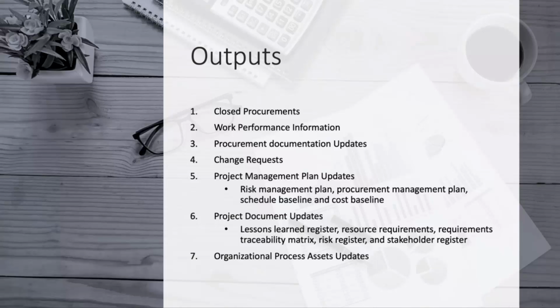Number 5, project management plan updates. Any changes to the project management plan go through the organization's change control process through a change request. Components that may require a change request for the project management plan include but are not limited to risk management, procurement management plan, schedule baseline, and cost baseline.